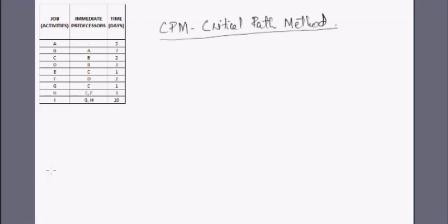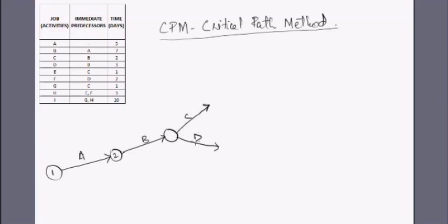We have taken the same question from the last class. We have nine activities. Let me redraw the diagram: the first activity A is followed by B from node 2, and then B has two followers C and D. The follower of C is E, and then we have E and F — merging them together because their follower is one and the same. From there we have G and H.